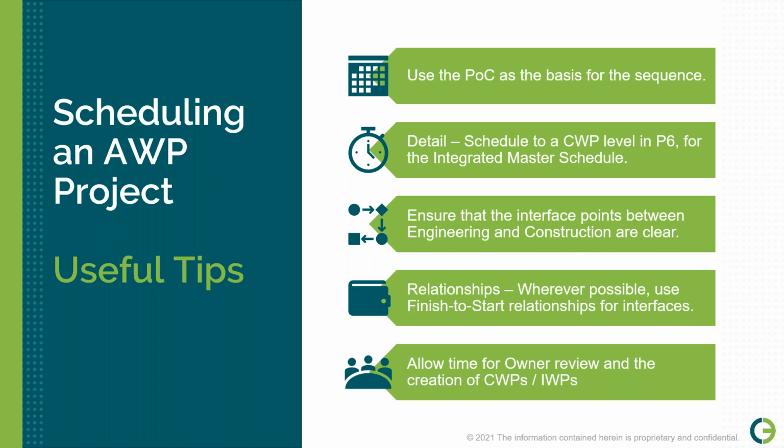In terms of the detail, schedule to a CWP level in P6, in Primavera or equivalent, whatever it is you're using. And that should be the integrated master schedule. So that should be down to the CWP, EWP level. Ensure that the interface points between engineering and construction are clear. A very, very big one.